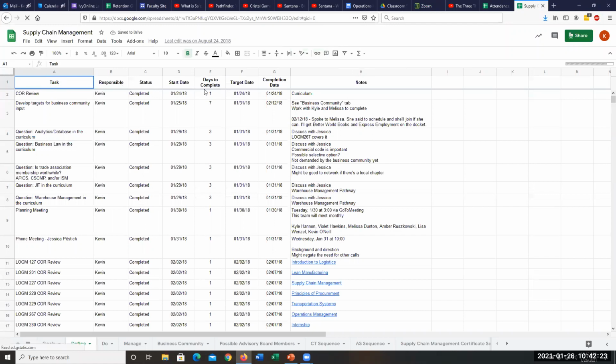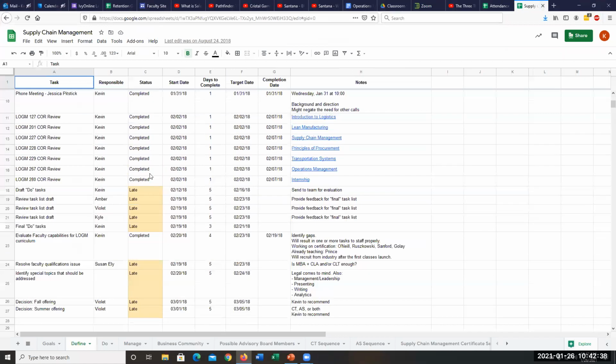Yeah, so here's one. This was early on at Ivy Tech, and I said, how are we going to make this work? How are we going to get supply chain management moving? So this was defined, and this was all the things I needed to know. And you notice I build in some formatting when things are late, but you put in the start date and how long it is going to take to complete. That calculates the completion date, and then I put in the actual. So you're constantly tracking. And you can see a few things here with no completion date in it because I wanted to be able to show you that. So this is one of my samples.